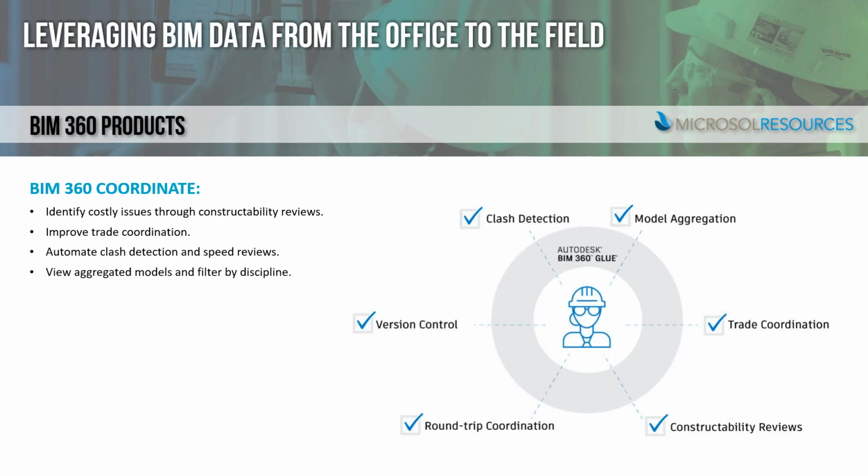In many construction projects, clash detection only focuses on a certain number of high-level priority issues. What this means is that quite a number of smaller clashes can go unresolved prior to construction and won't be resolved until construction is taking place, thus causing quite a bit of rework, time, money, and so forth.